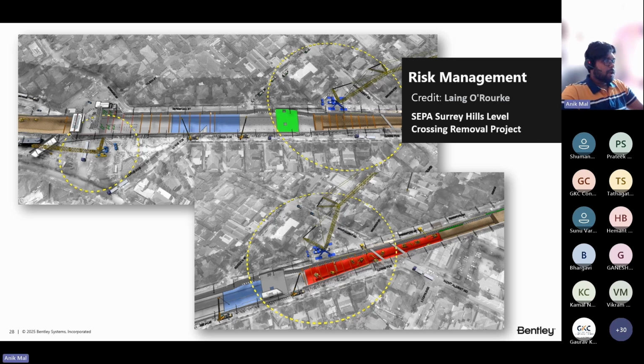All the lifts were simulated using Synchro 4D, which allowed the team to position the equipment and simulate the activity to clearly understand the scope of the work and any constraints which could have affected the program, thus helping them to identify the construction safety and risk visually prior to the activity.